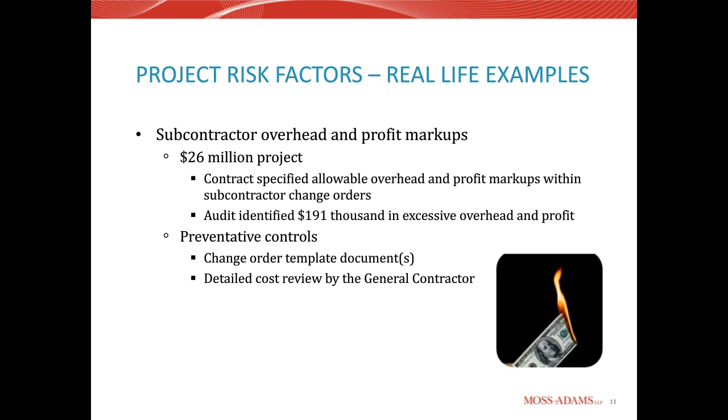It was very specific with regards to what that 15% covers, and that's something that's going to be vitally important both on an owner and on the contractor side. You want to make sure that what's being included within your overhead and profit, or if it's a general contractor, the fee, is indicative of what the contract would allow.